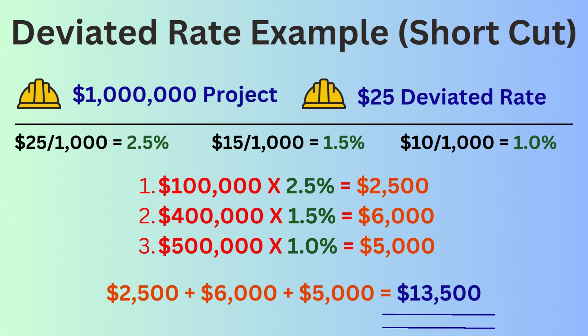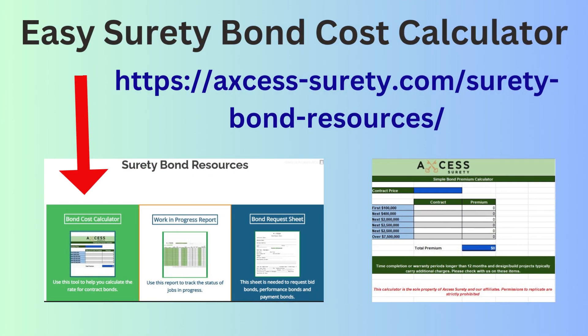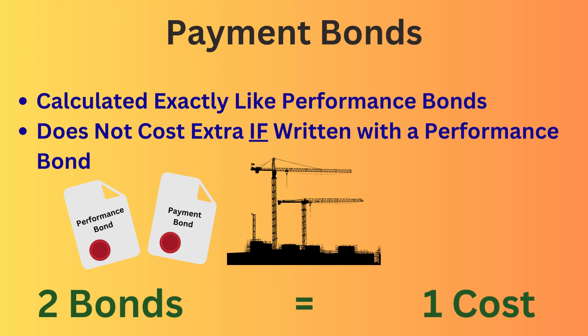Now that you know how the rate is calculated, we can talk about shortcuts. The rate divided by $1,000 is just a percentage, so instead of dividing by $1,000, we can use 2.5% for the first $100,000 of value, 1.5% for the next $400,000, and 1% for the next $500,000. If you do not want to do the calculation yourself, you can find a bond premium calculator at Access Surety — simply enter your rates and the contract amount, and the bond premium will be calculated for you.